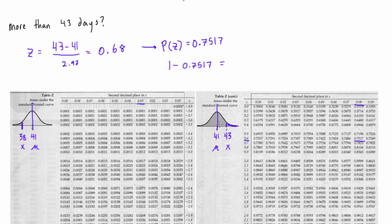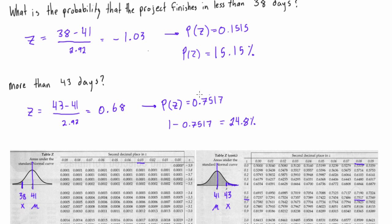And that's actually, I was close, it's a 24.8% chance. So we have a 24.8% chance that our project will be longer than 43 days.